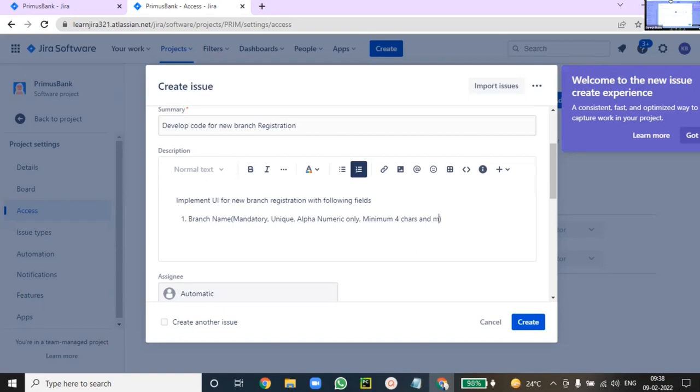Just for your understanding, I have given a condition. The Scrum model will not follow any FRS or SRS document. Without these details, how will the developer know what fields to implement and what conditions to implement? So while creating the task, the Scrum Master will clearly mention what rules they have to implement. Got it? In the waterfall model you will find all the details in the FRS. Here, everything will be described as a task.